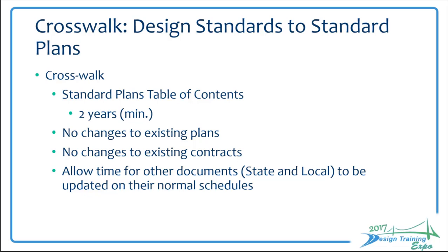So the crosswalk, this is a concept that has been used in the past and that we're implementing here. At the present time, we intend on publishing the number crosswalk with the standard plans for a minimum of 2 years. That way, for plans that are substantially complete, it wouldn't affect any of those existing contracts and that contract language that may already be present, and allow for a contractor that might see a misreference for, say, Gavin talked about index 400, to go to that crosswalk and see that index 400 is now renumbered to index 536-001, and that be, again, part of the contract.